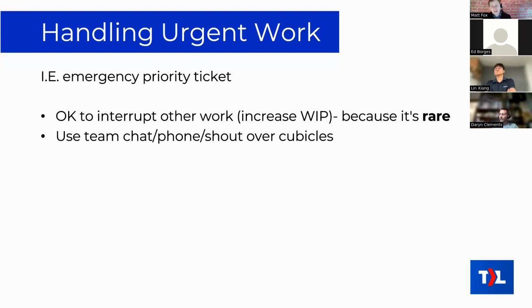Now, if emergency tickets are not rare, well, then you have a bit of a problem. This is all based on the assumption that emergency tickets are rare. So if all you're doing is firefighting like this, then you might need to adjust your definition of what's an emergency ticket, or maybe that indicates that you have some infrastructure improvements or some sort of improvements to fix the root cause of some of these issues.